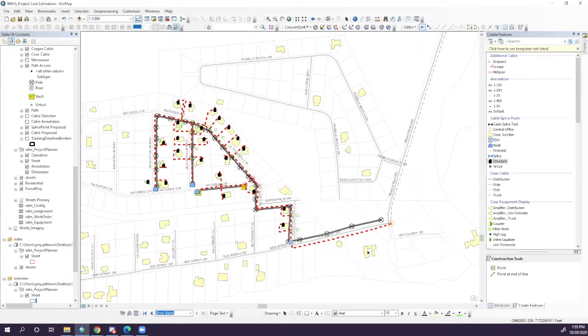And I'm doing that because I've got it spliced back up to existing plant, but I want to show both visually and in some of the reporting that I can do that this project isn't online yet, right? I've basically just built these components out as part of my planning and management process here. So what this allows us to do is build this project out and keep everything in that state until we are ready to build it in real life, bring it online, things of that nature, okay?